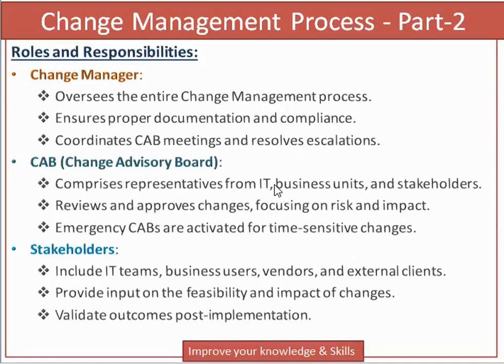Topic: roles and responsibility. Change manager oversees the entire change management process, ensures proper documentation and compliance, coordinates CAB meeting and resolves escalation. CAB, Change Advisory Board,